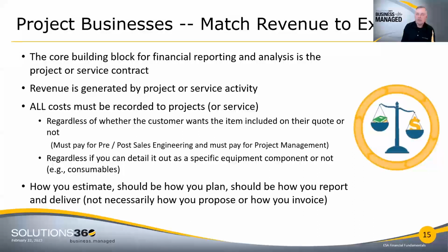At our company, we have this idea that how we estimate should be how we plan our projects, should be how we report on our projects, and should be how we deliver on our projects, not how we propose it or invoice it. We can put all kinds of presentation layers on our proposals and our invoicing, but behind the scenes, we should be estimating accurate costs, we should be tracking actual costs, and we should be reporting on those actual costs. Then we know whether we're running a healthy business or not.